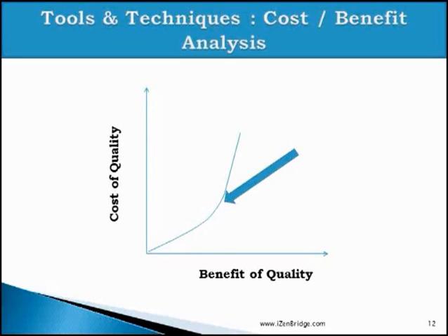So why are we discussing it here? Because we are in a quality planning process. So we need to identify first, what is my cost of quality? What is the cost of non-conformance? Non-conformance cost for an aeroplane is very high. Non-conformance cost for a website which is only providing a simple query interface to search a product may not be that high.